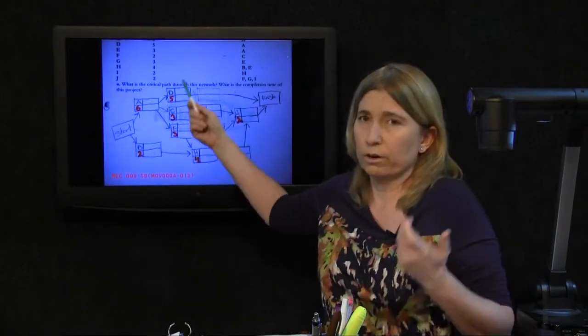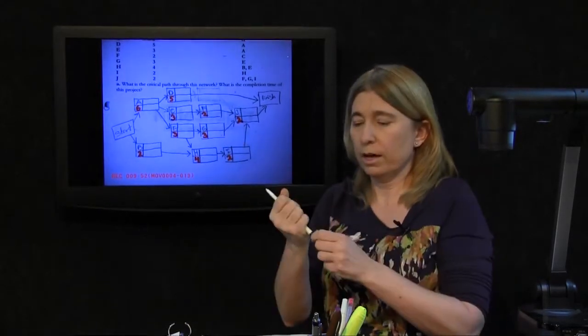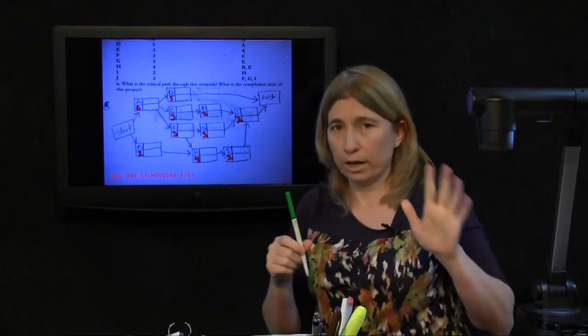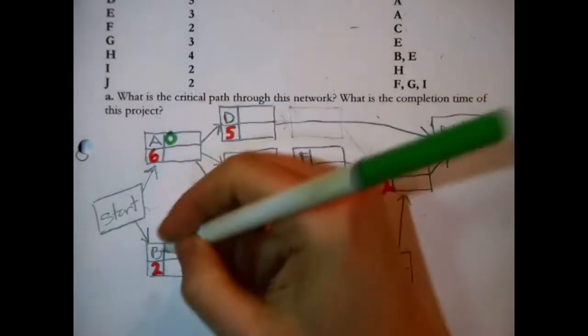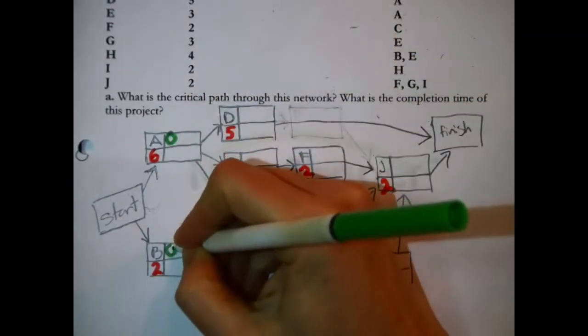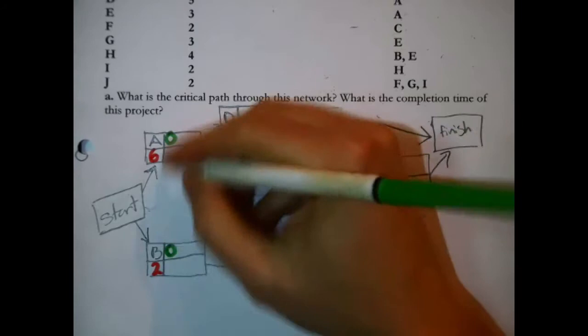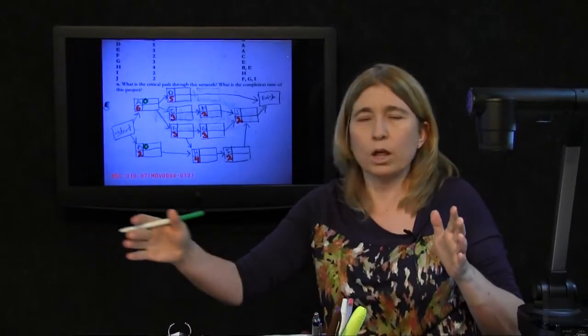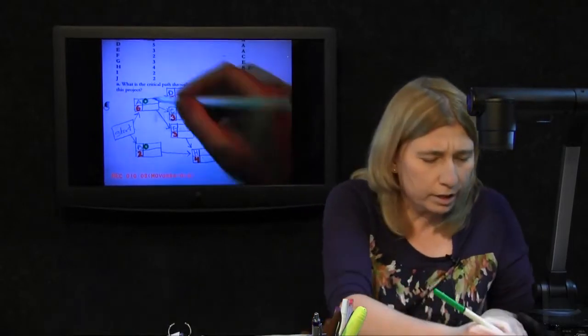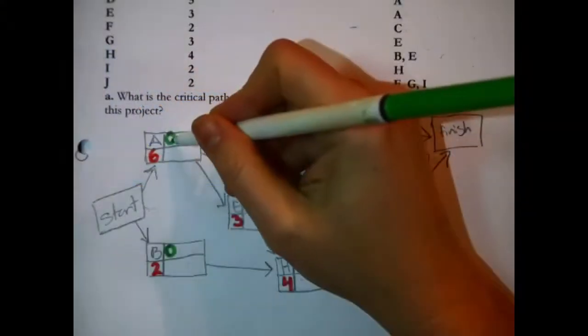They're A and B. A and B automatically have early start times of 0 because there's nothing stopping you from starting work on either one of these right now, and right now on a number line is 0.